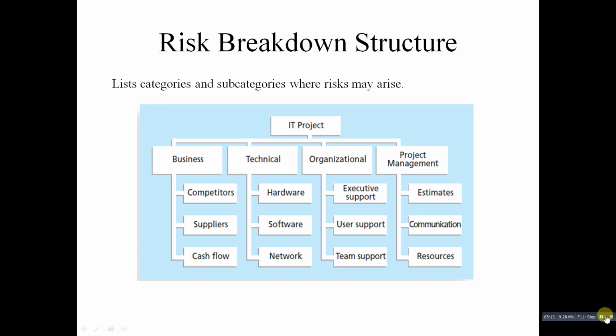For the human resource management area, risk conditions may be poor conflict management, poor project organization and definition of responsibilities. For the communication knowledge area, risk conditions may be carelessness in planning or communicating. For the risk management area, risk conditions may be ignoring the risk, unclear analysis of risk, poor insurance management.